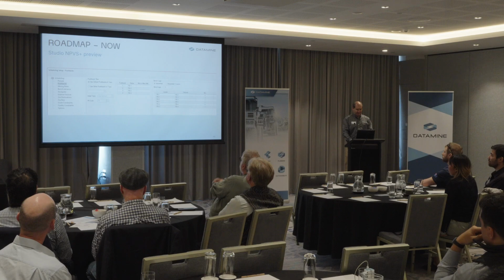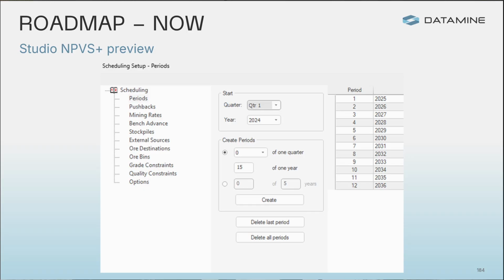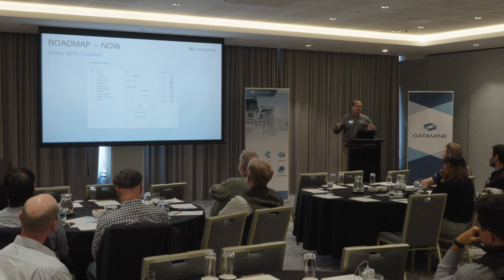I'll just go slowly here. You're defining the different periods. Here we have flexibility to work with periods of different length. We can start depending on the lifespan of the project. Usually if it's less than 10-15 years, we want to make quarters and years after that. We can do similar if it's a 100-year mine life. We can do 10, 15, 20 periods of 1 year, followed by X periods of 5 or 10 years. All of this can now be configured.